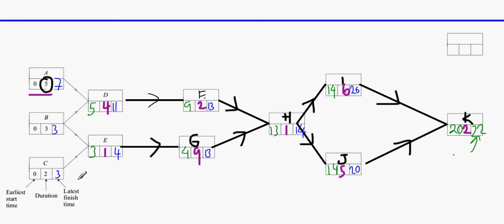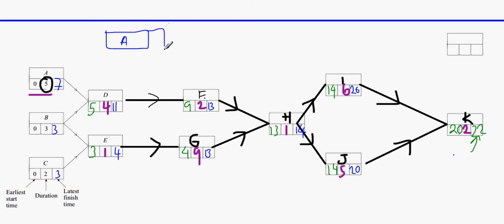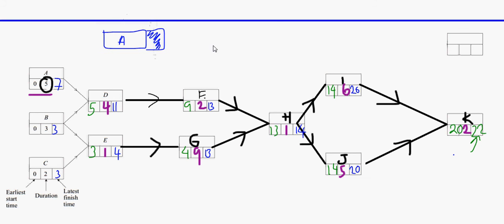Those are the early and latest finish time algorithms. We can see that activity A can start on day zero, but the latest time it must finish is day seven. This gives us a float — a flexibility of two days. So activity A can start on day zero and finish on day five, or start on day one and finish on day six, or start on day two and finish on day seven.